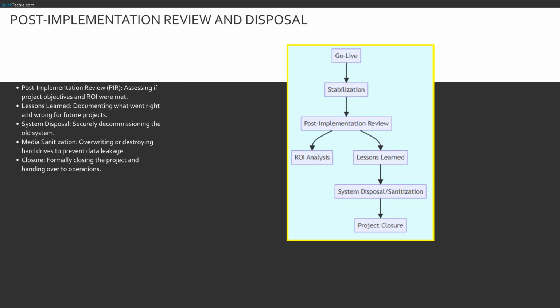We aren't done when the system goes live. We enter the post-implementation phase. We conduct a review, PIR, to ask, did we get the ROI we expected? Did we meet the business needs? We document lessons learned. And finally, we must handle the ghost of the system past, disposal.